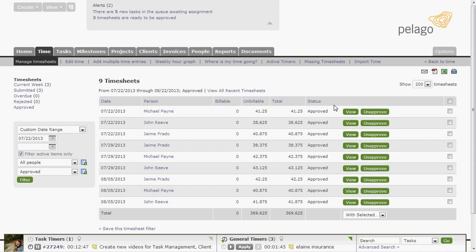And the reason why that's done is the project level permissions that Intervals features. Since administrators see everybody and see all projects, you could run into a scenario where if a manager was approving a timesheet, they only see people where they share access to one project. So they might not see everything that the person is working on. So the timesheet approval mechanism would get very complicated where somebody's approving a partial timesheet for that particular project. So with Intervals, any administrator can approve time. This is an introduction to timesheet approvals.